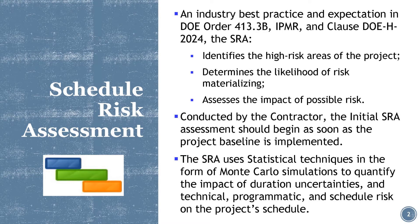In general, the SRA uses statistical techniques in the form of Monte Carlo simulations to quantify the impact of uncertainties in duration estimates, along with technical, programmatic, and schedule risks on the project schedule, and the probability of meeting the schedule objectives.